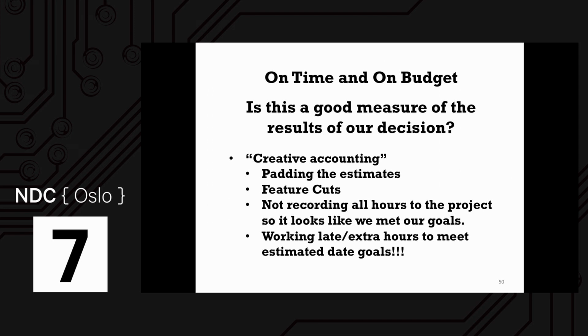I will ask that. Has anybody ever had crunch time where you had to work extra hours at the end of the project? I'd say way over half of you have raised your hands. What this basically means is the next project, they will say, oh, that other project took 6 weeks. This next one's like that one. It will only take 6 weeks, which implies we're all going to have to work a lot of extra time near the end, as if it was really that easily compared, and it's not.